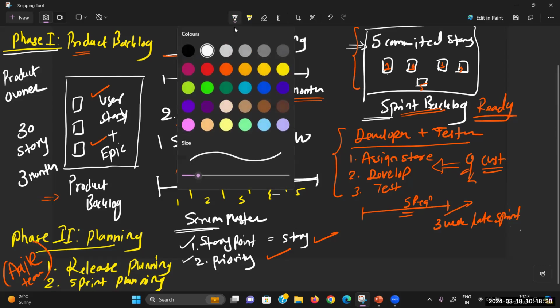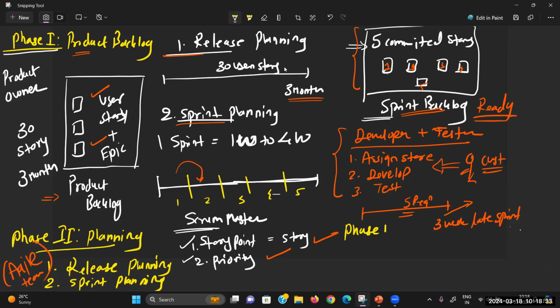After that, we have a last phase to be covered. Phase number 3, which is actually called the retrospective review. Do remember, this is our last review process. Retrospective review is very special in Agile. Basically, it is a review which is taken care of at the end of every sprint. Okay, so they will decide that whatever problems you might face during completion of that one sprint, the same issues you should not face in the next sprint. So obviously it is a kind of process improvement. For process improvement, this kind of review happens.